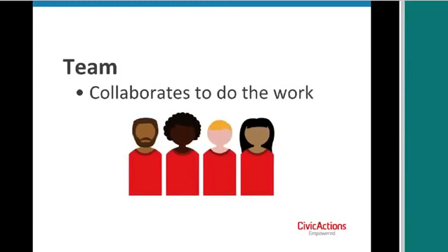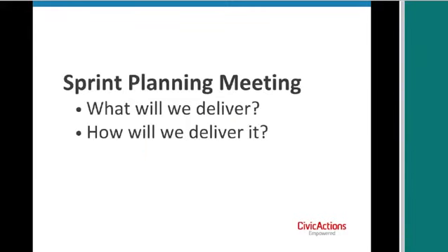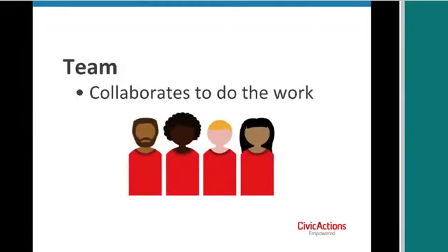The decision at the end of the sprint planning meeting, the list of work, is frozen at that time, and you don't shift things in and out of that sprint. You just decide this is what we're going to work on and focus on that exclusively. The goal as the team is doing the work is for them to collaborate together and be able to ask the product owner or even end users directly questions to help them get their job done.